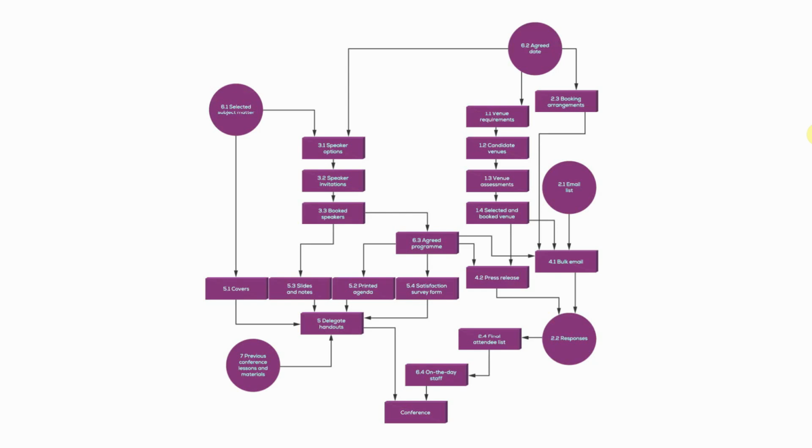And so when we create a product flow diagram, one, it helps us visualize the sequence of events, but two, it's actually an important part in the estimating process because it's used in conjunction with the estimates to help create a schedule and ultimately feed into the project plan, and that information ultimately ends up in the business case, and you see how it all sort of relates to each other.